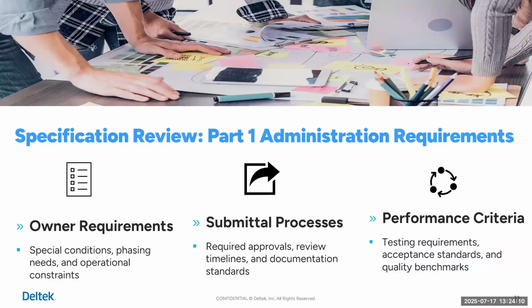When it comes to the specifications, part one, the CA person could work with the project team. In part one of the specs, it talks about the administrative procedures. Well, the CA person, before the drawings even hit the street, will work with the project team to establish clear submittal requirements, defining what shop drawings they want to see, the product data, the samples. These are some things that the contractor will be providing before proceeding with the work and installation.